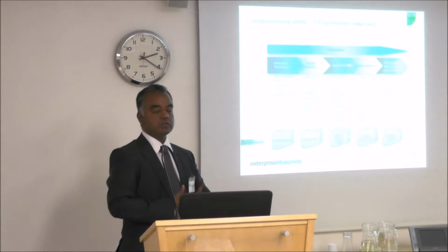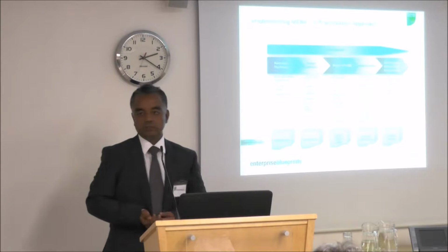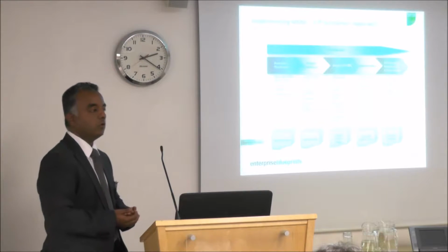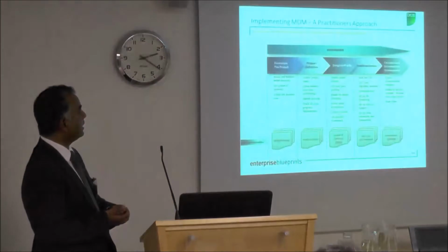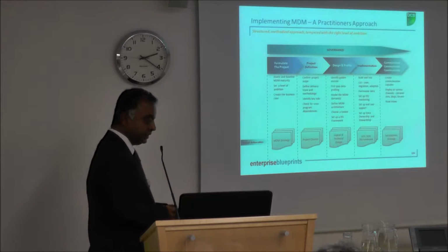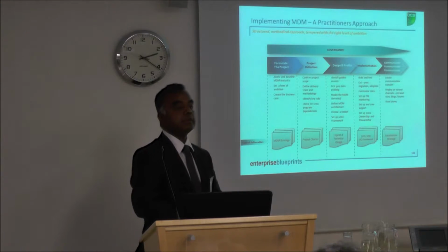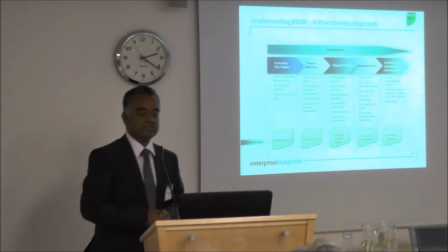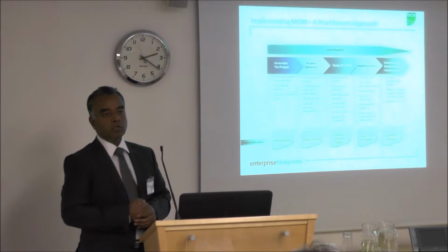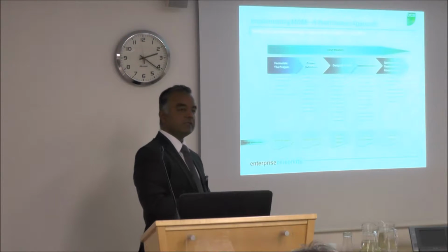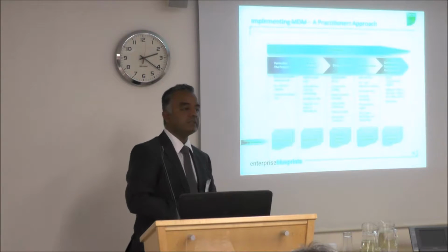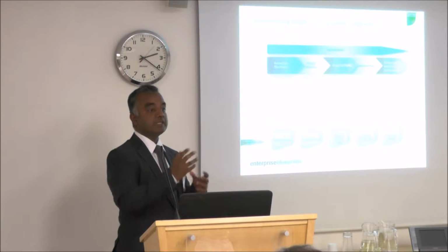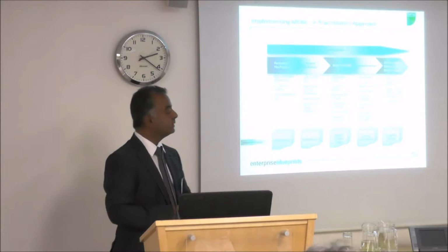And yes, there are lots and lots of big things that you can do so far as master data management is concerned, and you can aim to do that on day one, but you probably will set yourself up for failure. So what you need to do is to probably begin with the right level of ambition. If it is a large organization, it is even more important to set the right level of ambition. In order for you to set that ambition, you first need to do a baseline of where you are. So a lot of this is a baselining of your existing master data management capability. Some sort of an assessment exercise about the various different disciplines that I talked about earlier in master data management. Just start asking some basic questions about where you stand in each and every one of those MDM disciplines.